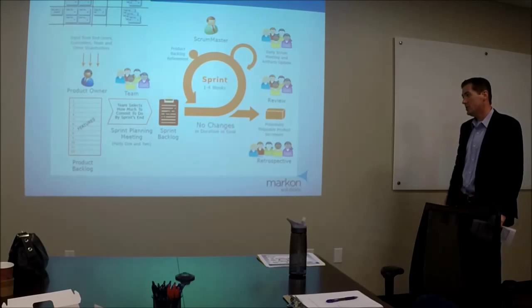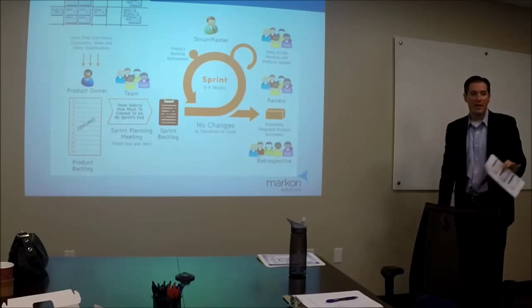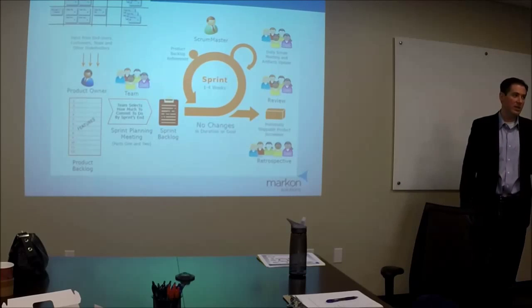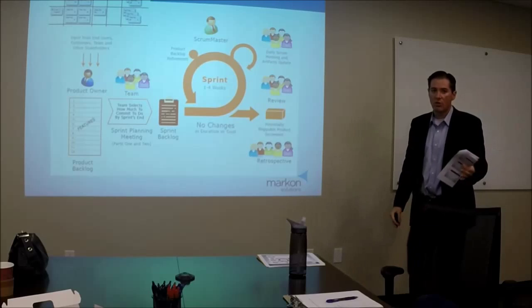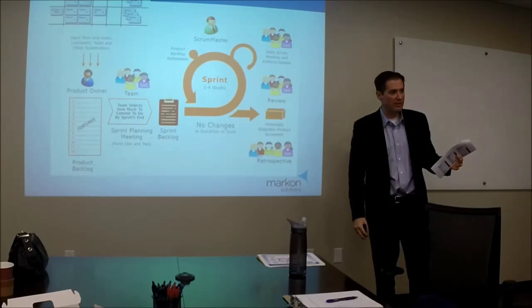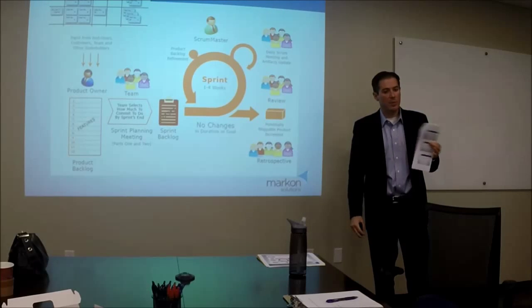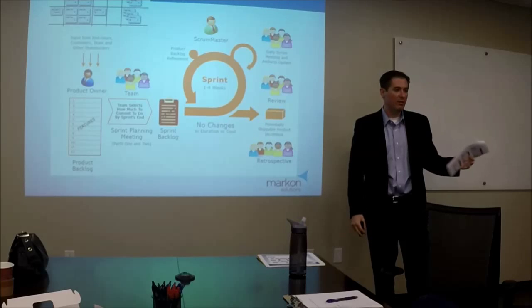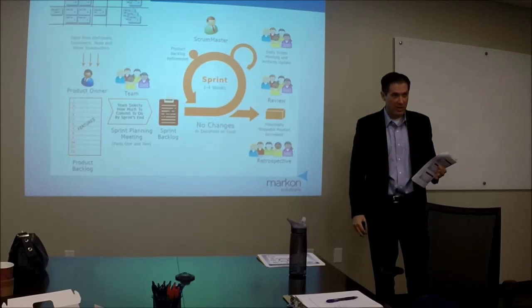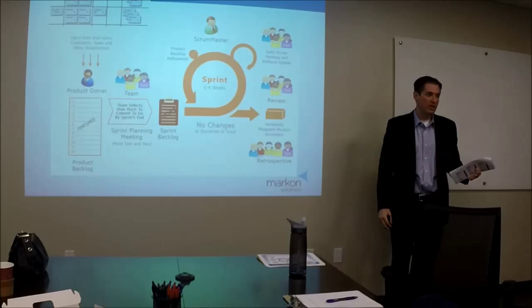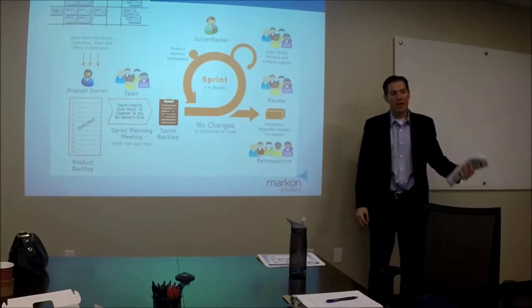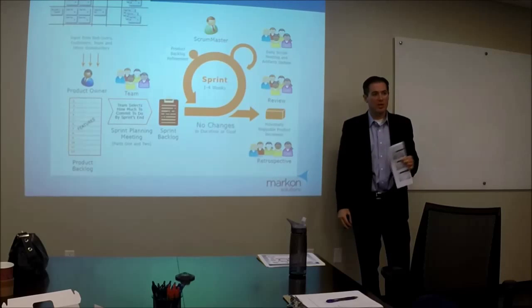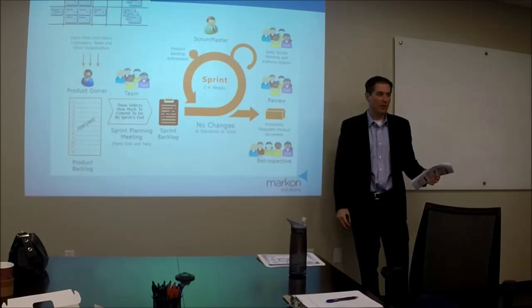Here it says no changes in duration or goal. One thing: duration never changes. It's okay to change a goal. The product owner wants something a little bit different, that's no big deal. We're going to add this because the product owner said so. What you don't want to do is change that demo date. If you set up a demo date of July 15th, you hold that demo date. If you can't get that feature put in by July 15th, you say no, you don't cancel the demo. You've got to keep the demos going.